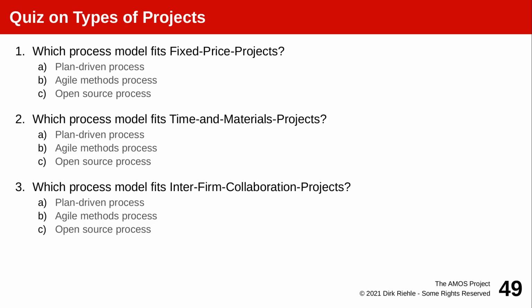How about time and materials projects? So the customer says, give me your daily quote, a number of people, how much is that, and we will pay for your time. Well, that calls for an Agile methods process, because Agile methods does not promise in general a specific delivery 2 years from now. So if the customer is willing to accept that, then the customer relies on you to be honest and truthful and doing hard work, but then they pay you by the day, or in some way correlating to the time you put in, and they will get what you develop. And if you're good people, you will actually always deliver business value first, as we will see, and hence the customer is actually benefiting with some useful software all the time.